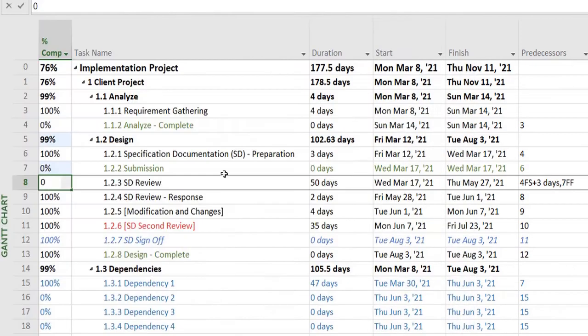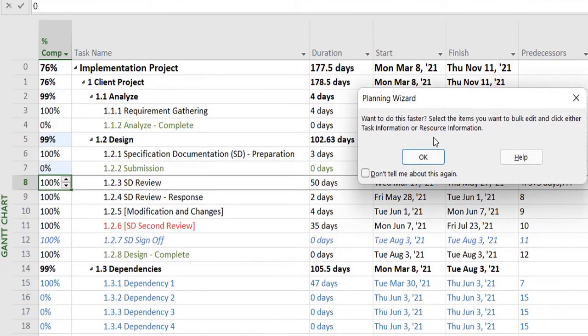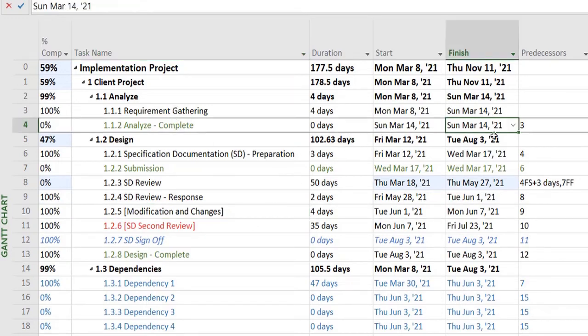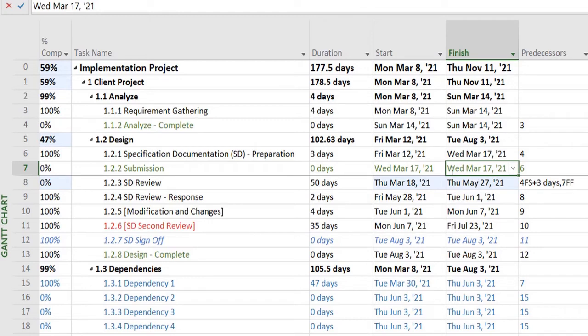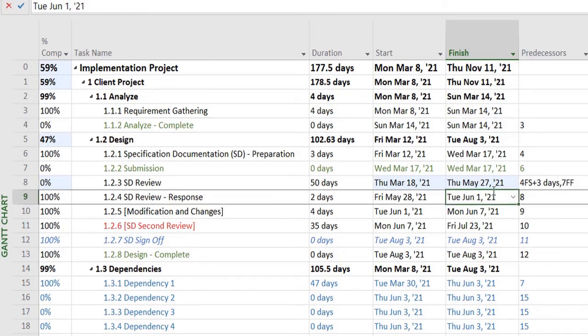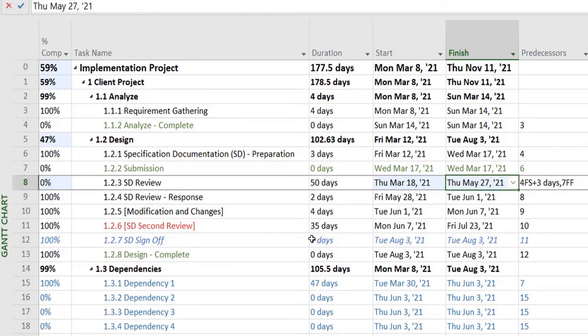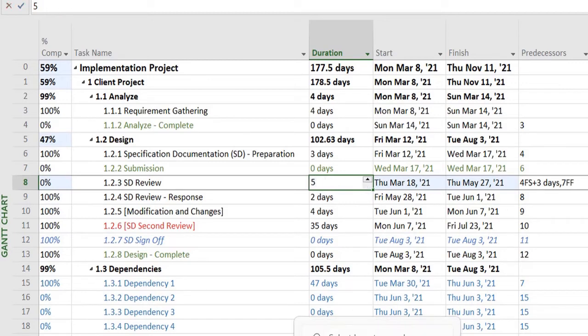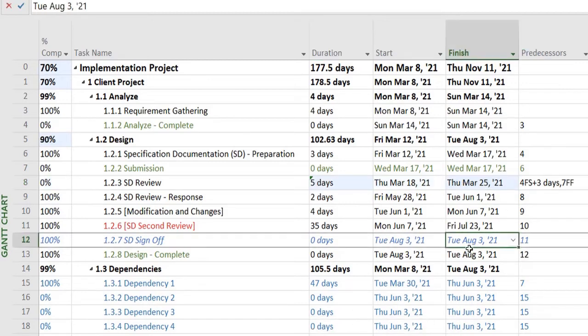It will portray this information accordingly. Basically, task number 4, as you see, is finishing on the 14th, and task number 7 is finishing on the 17th. However, as I marked this to start after 3 days, it has created a lag and pushed it forward, keeping in view the number of activity days that it requires.